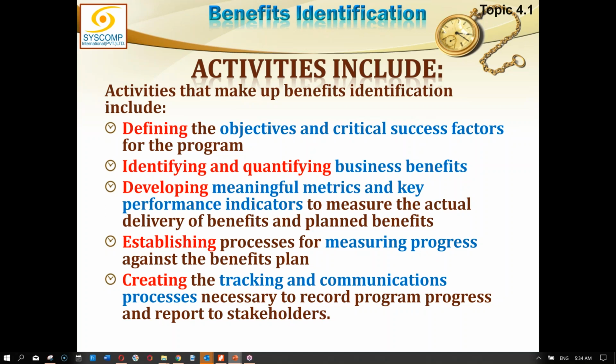Why? Because metrics will help us measure the benefit. We have to understand that if we can't measure anything, then it is of no use at all. We do not want that, where we don't have any way, capability or mechanism to know how much we have done. So metrics have to be defined for every benefit, even if they are Likert scale metrics, which could not otherwise be defined, but we create our own scale and we define those benefits according to that.